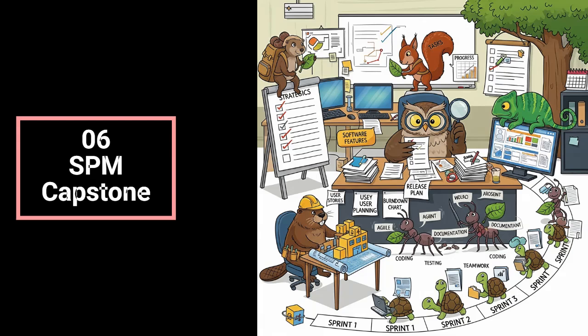Pretty much. So then assignment 3.8 is the week 3 release plan. This sounds like the big picture strategy. It is. You're deciding which user stories go into which of the 3 sprints. Based on? Based on priorities, the risks you identified, those dependencies, and the story point estimates. It's sadly a bit of a juggling act. I bet. This is where you start thinking strategically about delivering value bit by bit, right? Precisely. The lesson on release plans they recommend would be vital here, understanding that sequencing over multiple sprints.